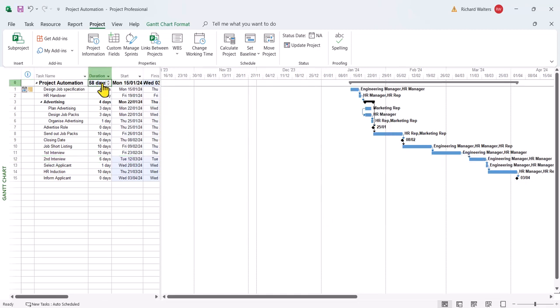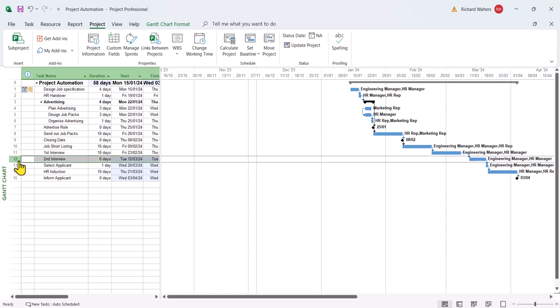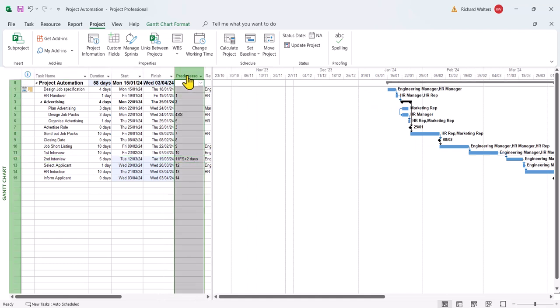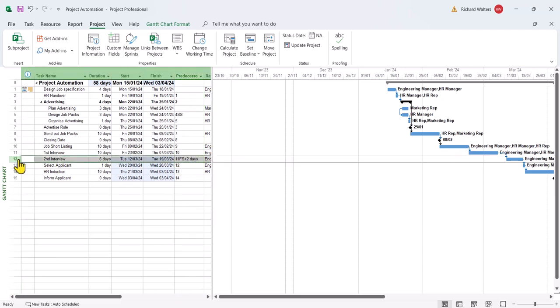So there's the 58 days now. Didn't change the second interview, but what it does do, in the predecessors column, it tells you plus two, because that is lagging behind. So that's where it does tell you against that one task. So it's a plus two, but it doesn't change the duration of the task.